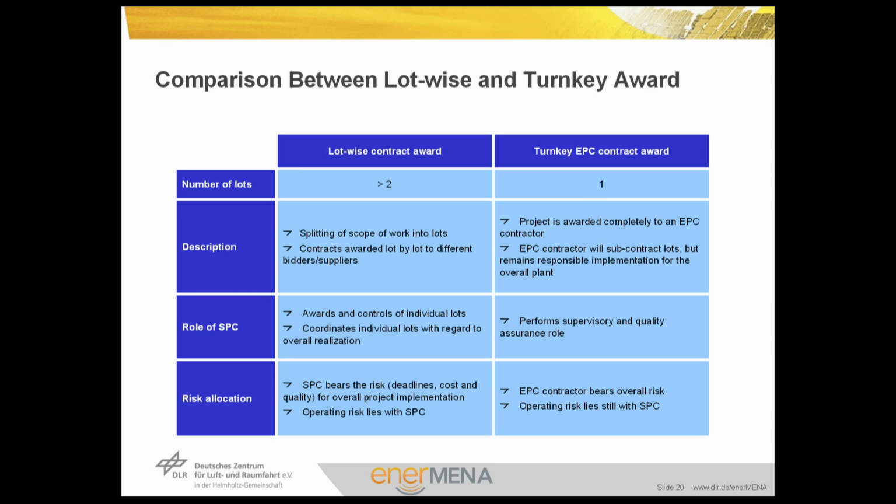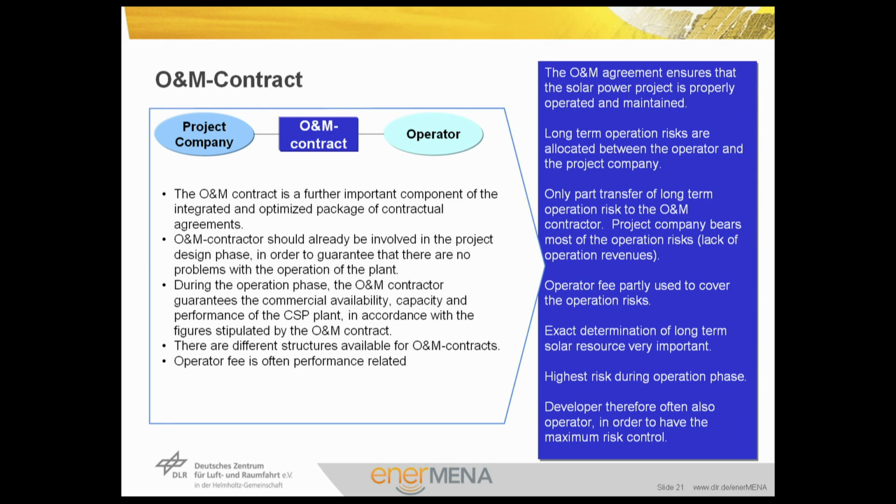This is important to estimate the capability of the plant in order to calculate its availability. So in the turnkey EPC contract case, the EPC contractor bears overall risk and the operating risk lies still with the special purpose company.